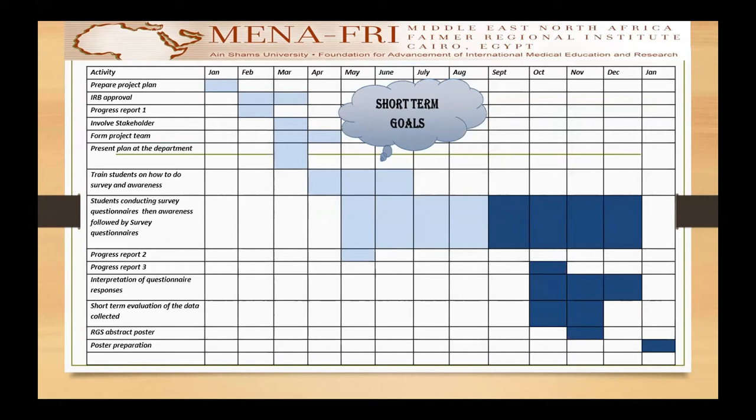We then discussed how to write the survey questions and formed the survey together, which the students distributed to their community members. My main plan was to conduct 50 surveys — I reached 57, and I'm going to continue the survey.